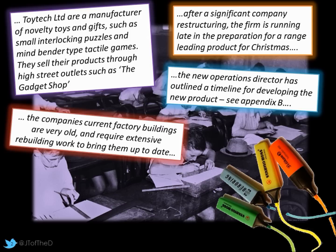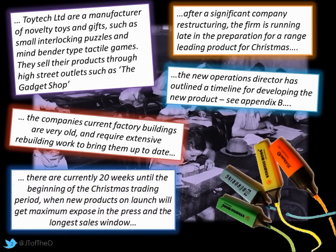A couple of other bits of information might be relevant when thinking about critical path. The company's current factory buildings are very old and need to be updated - they may have to do lots of work including rewiring and re-plumbing to bring those up to speed. They're currently 20 weeks away from the Christmas trading period, which is when they want to launch. So in terms of critical path, 20 weeks is our window.